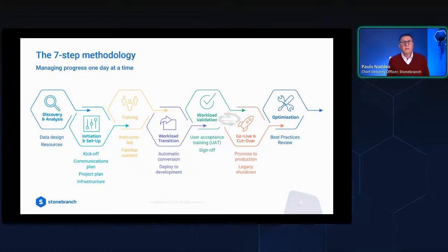The next step is initiation and setup. So at this point, we will stand up the infrastructure. So we will install the application on the designated servers, and we will prepare the documents that will allow us to carry out the governance of the project. So at this point, we will prepare a communications plan, identifying the main players of the project.